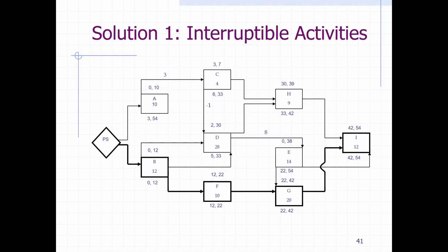This is huge. So E is one of the activities we've talked about. If you're going to use the remedy approach with two factors, then either you can stretch this activity, the 14 days, within the 38 period, interval period, or the first was stretch, I believe, right? We've talked about it. And the second is the splitting. So then we can split the activity as needed.